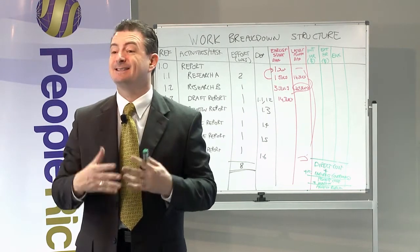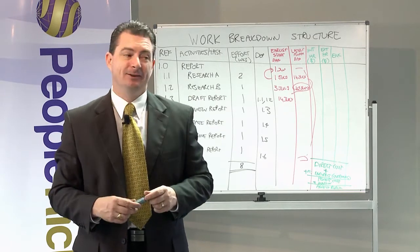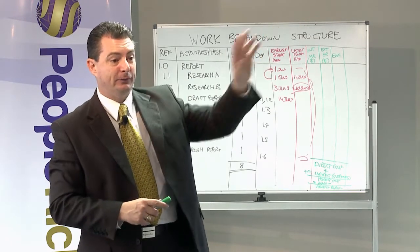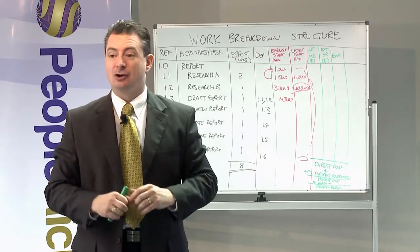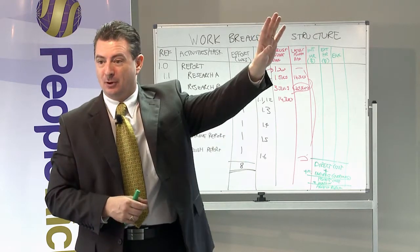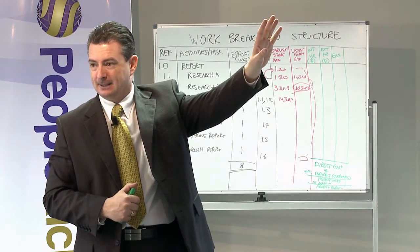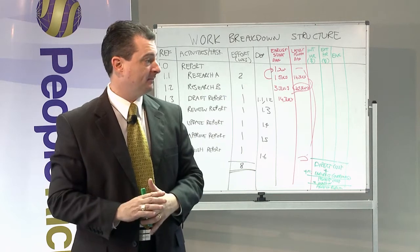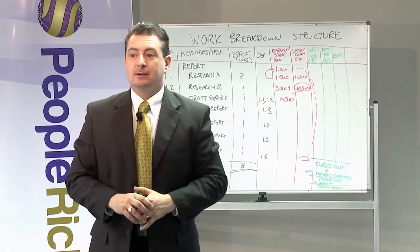When we look at cost later, we'll be also talking about contingency fund. Contingency fund is a reserve held for risks, and it's not held by the project manager. It's actually held by the project sponsor. Any questions about that so far?